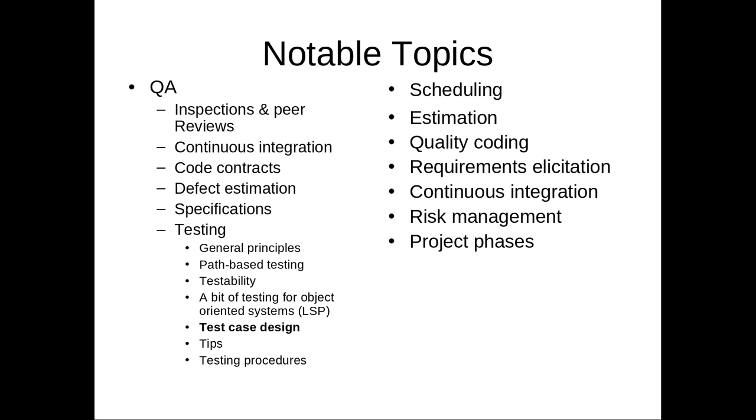To a degree, a lot of elements of the class can be thought of as risk management writ large, like balancing the risks associated with a project throughout its phases. And we talked about several different types of things there, contingency planning versus mitigation, for example. We talked about the role of risk scanning, looking for new risks and identifying when previously identified risks are materializing or have a strong chance of materializing. And we talked about elements associated with project phases.